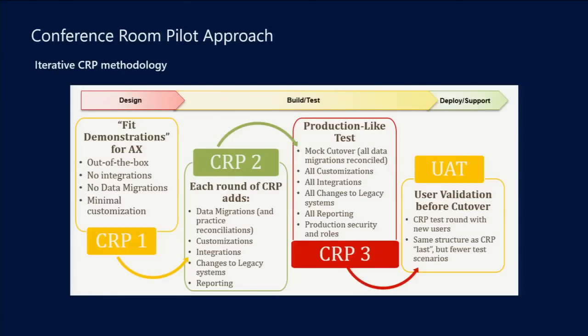We build. When we build, we're then coming back and running a CRP3, maybe CRP4, depending on how many iterations, and presenting back to the customer the customizations that we've built based upon the detail we gained from CRP2.